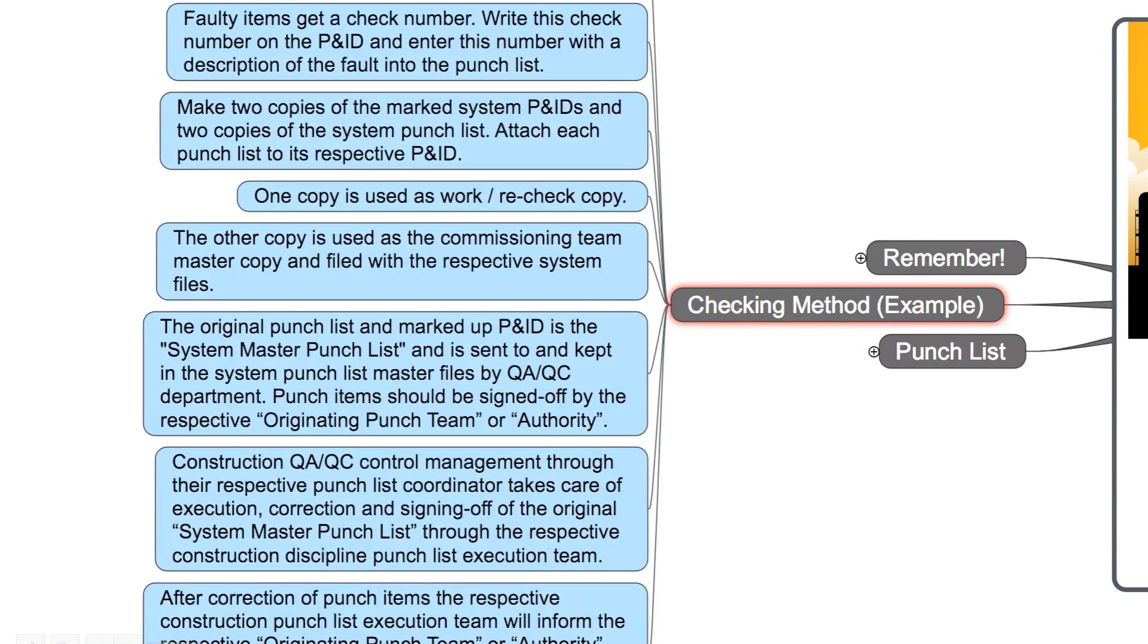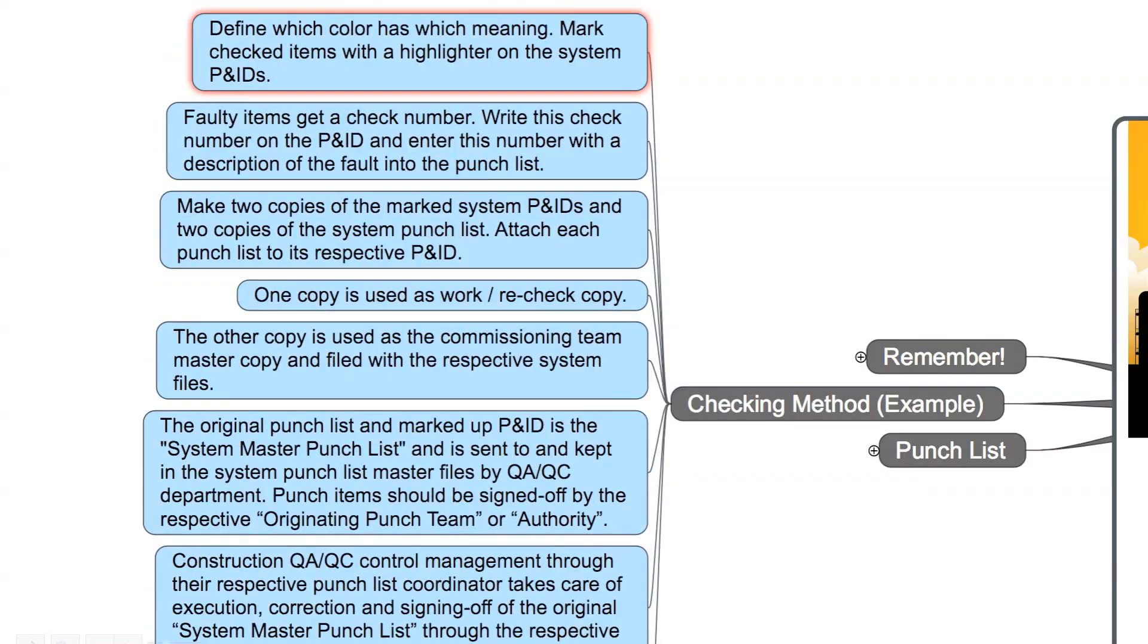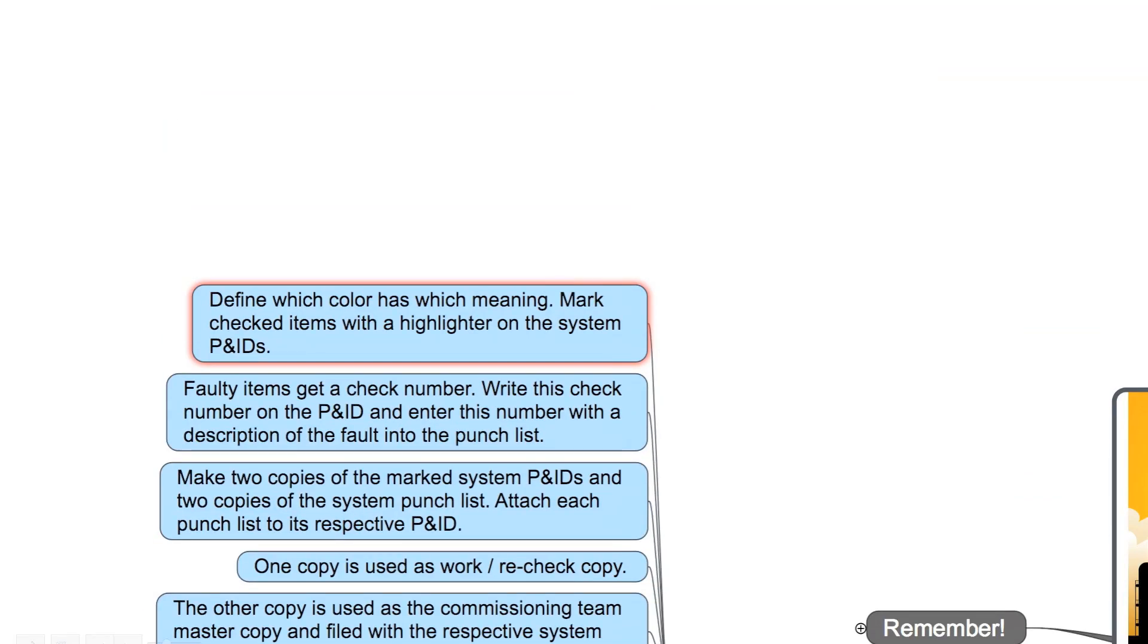I want to give you an example of how to perform a P&ID check. Please be aware that this method can change in different industries, but the basic rules apply. At first, define which color has which meaning. Mark checked items with a highlighter on the system P&IDs. Faulty items get a check number. Write this check number on the P&ID and enter this number with a description of the fault into the punch list.